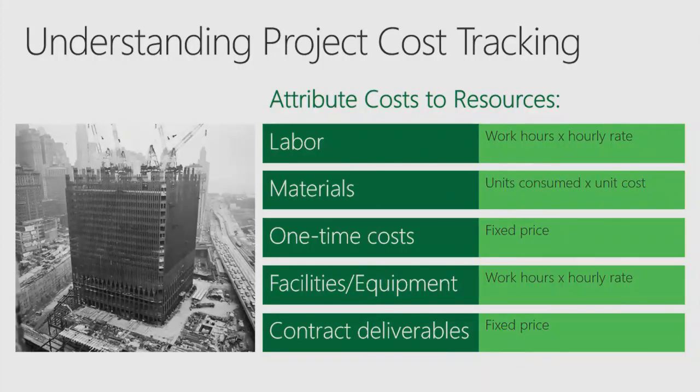Those are usually things that you have to schedule. So those are tracked very similarly to labor or people resources on your projects. Hourly rate times the number of hours you're using that resource, and it does the math for you. It's real easy.